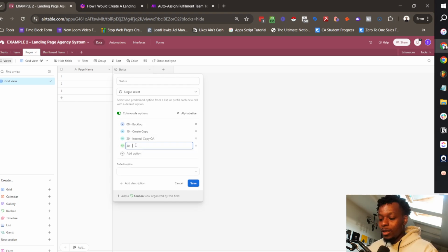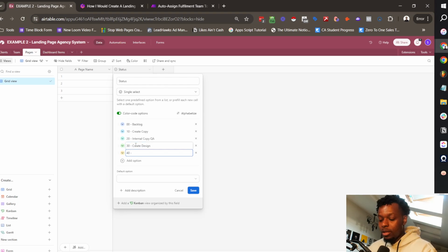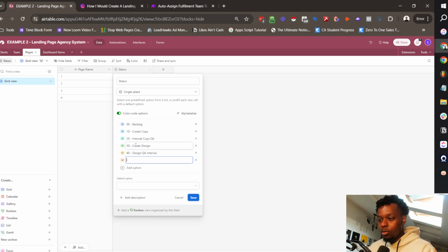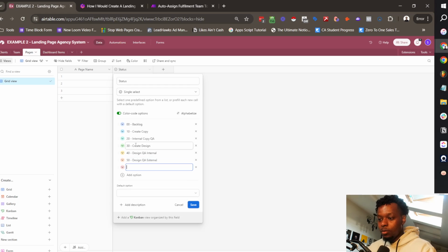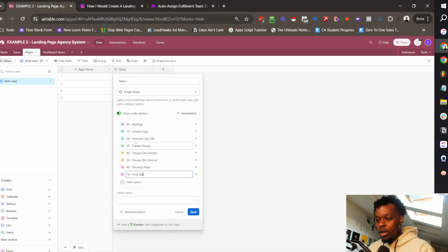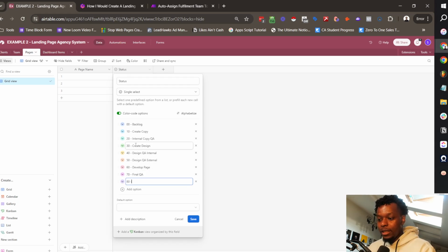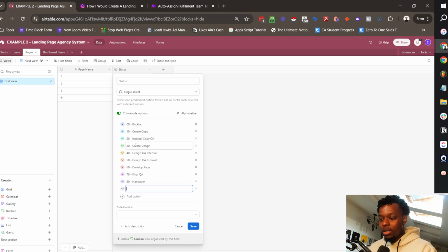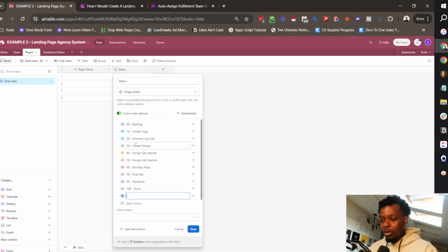So 30 is create design, 40 is design QA internal, 50 can be design QA external, 60 is develop page, 70 is final QA, and then 80 is handover, and 100 is done. And then we're going to add a couple more.